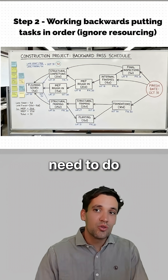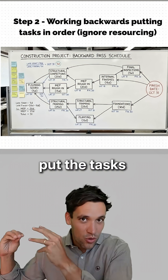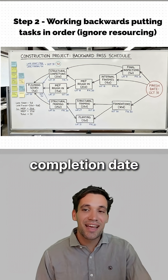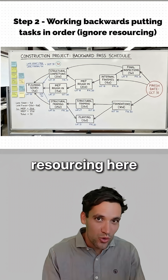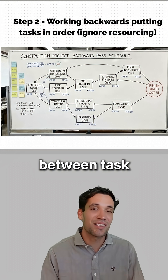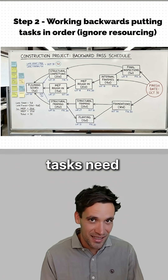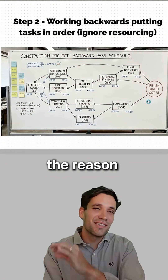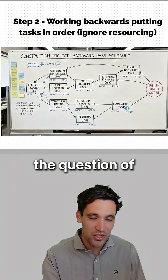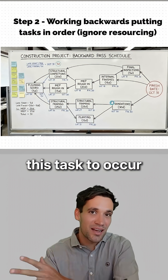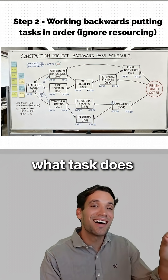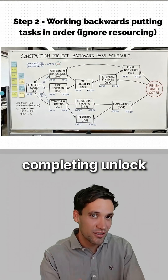Once you've worked out all the work you need to do, put the tasks in order working backwards from the completion date. Critically, ignore resourcing here — just look at the mandatory dependencies between tasks. What is the actual sequence tasks need to happen in? The reason I start from the end and work backwards is because it's much easier to answer the question of what needs to happen for this task to occur, rather than asking what does this task completing unlock?